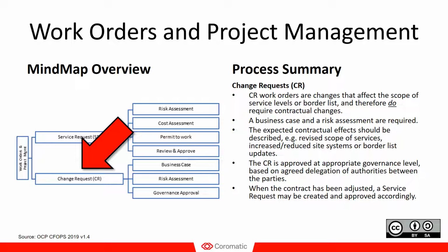It could also be that you move the boundary responsibilities so that the risk is pushed from one party to another, which means that as the risks get affected by this, the party taking a higher risk would want to either be paid more if it's the supplier, or if it's the customer, they would like to pay less because they carry a larger part of the risk. It could also be a contract being split between several suppliers, which would change the scope of these, and so forth.